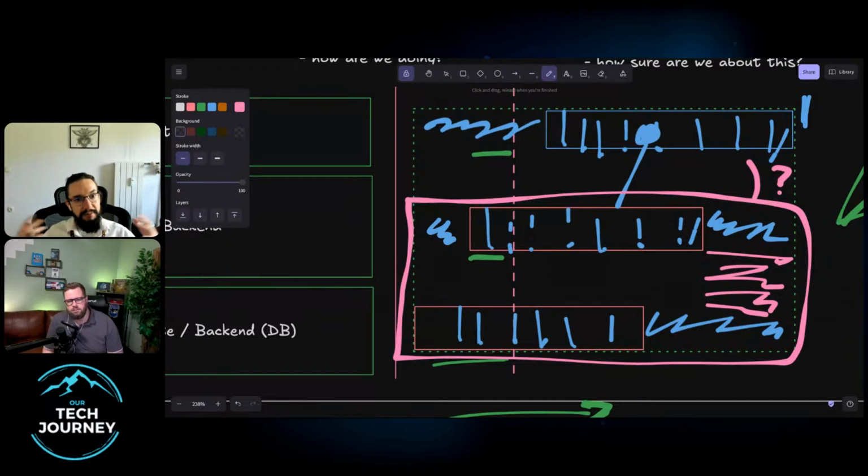And when the team does this kind of split, now there's more pressure on the manager to create unimportant tertiary work to keep everybody busy. Because the teams themselves, by virtue of how they're slicing up the work, will gravitate towards handoffs. And when you're having handoffs, you have this mentality of, oh, nobody owns the full path to production, so we just need to finish each slice, each horizontal bit, each layer of the cake. And then when it's done, we have a meeting and we roll it out.